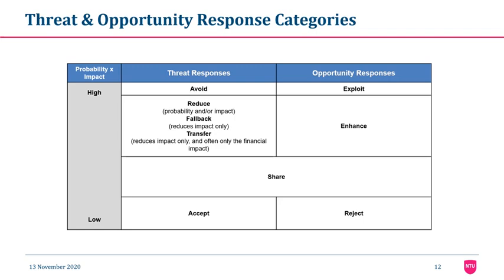Another risk is, for example, inaccuracy or incomplete information in the survey file that could lead to rework of the design. And our response here is to reduce its probability. To reduce the probability, we should work closely with the surveyor to verify that the survey file is accurate and complete, and we may need to perform additional survey as needed. So we reduce the probability by doing more accurate surveys.